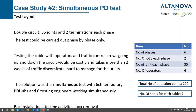The solution found together with the cable owner — the utility — was to install a permanent sensor and make it available for simultaneous testing, in order to have a simultaneous test during commissioning and an infrastructure that would be useful for future testing sessions.